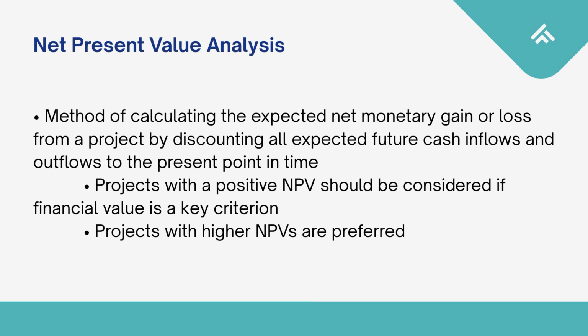Next is net present value analysis. A method of calculating the expected net monetary gain or loss from a project by discounting all expected future cash inflows and outflows to the present point in time. Projects with a positive NPV should be considered if financial value is a key criterion. Projects with higher NPVs are preferred.